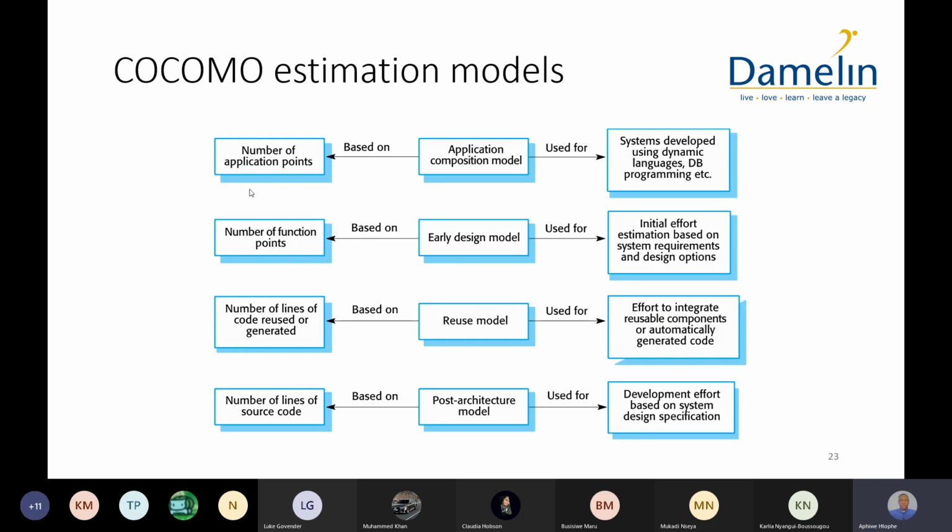And then lastly, you can estimate the cost of software based on the number of lines of code. So to say we wrote 30,000 lines of code to achieve this software, and then you maybe say 1 rand per line of code, something like that. Okay, so it's estimating based on the number of lines of code in the source code.